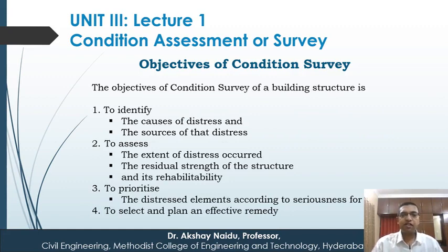Now objectives of condition survey. The objectives of condition survey of a building structure are, to identify the cause of distress and the source of that distress. For example, we may ascertain that reinforcement bars of a particular beam or slab are corroded, and we must have ascertained that this must be due to moisture seepage into the beam or the slab.